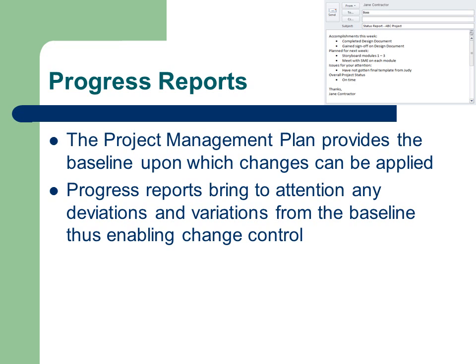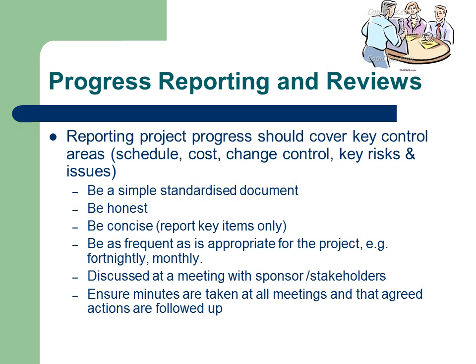The project management plan provides the baseline upon which changes can be applied. Progress reports bring to attention any deviations and variations from the baseline, thus enabling change control. During most projects, reports are provided periodically in accordance with the communications plan. Reports are provided at all levels of the project. For example, contractors or vendors will supply progress reports to the project coordinator or project manager to provide information on the work they have done during the last period and what they will do in the next period.